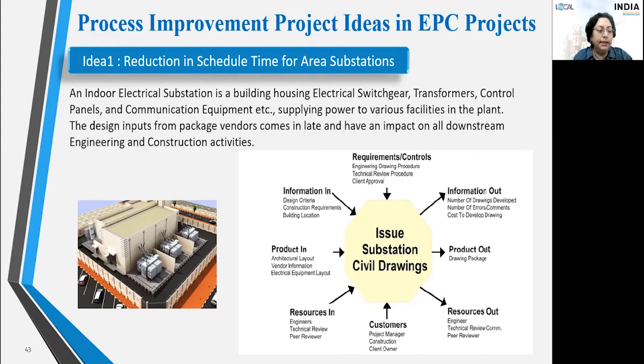We all are aware that an indoor substation supplies power to various facilities in a plant. A substation is a building housing the transformers, switchgears, and communication equipment that is required for the power supply. Now, during the construction of the project, these substations supply power required for construction work. So you can understand that it is a very critical activity. The substation needs to be ready within a stipulated time so that it can supply power to the construction work.